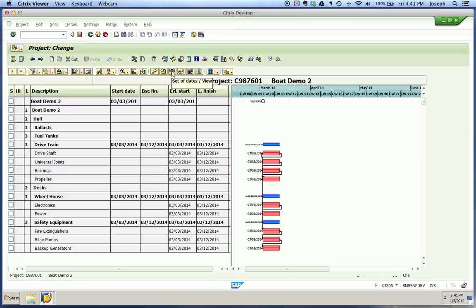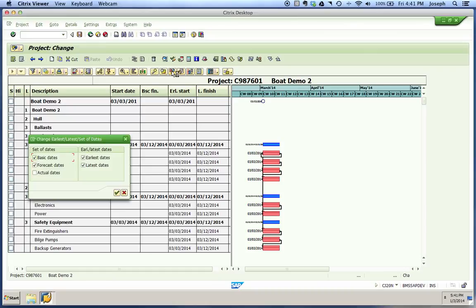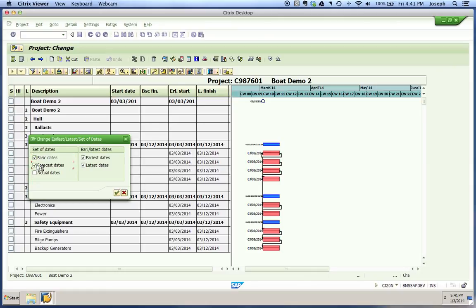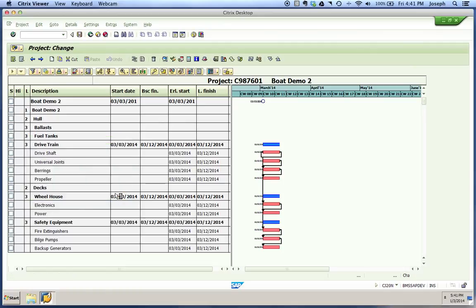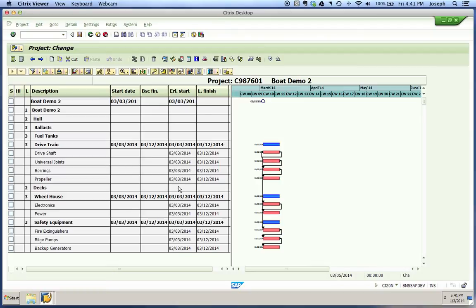We can go up to this icon and choose if we want our forecasted dates on here. We'll talk about those in a later demonstration. We can take that off and maybe use our latest start dates instead. That will clean it up so you can see it better. We're unscheduled here, so everything's going from the same date. You'll notice here, 3-3 to 3-12, our earliest start and earliest finish, covering our activities.